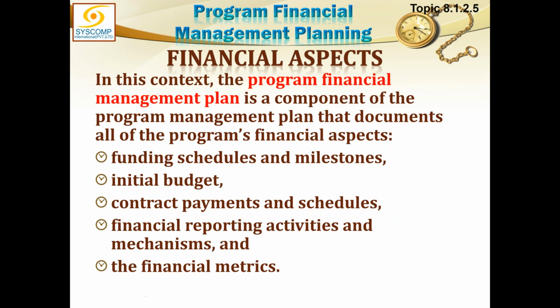In this context, the program financial management plan is naturally a component of the program management plan that documents all of the program financial aspects: funding schedules and milestones, initial budget, contract payments and schedules, financial reporting activities and mechanisms, and financial metrics. All of this must be included in your financial management plan. They must be covered.